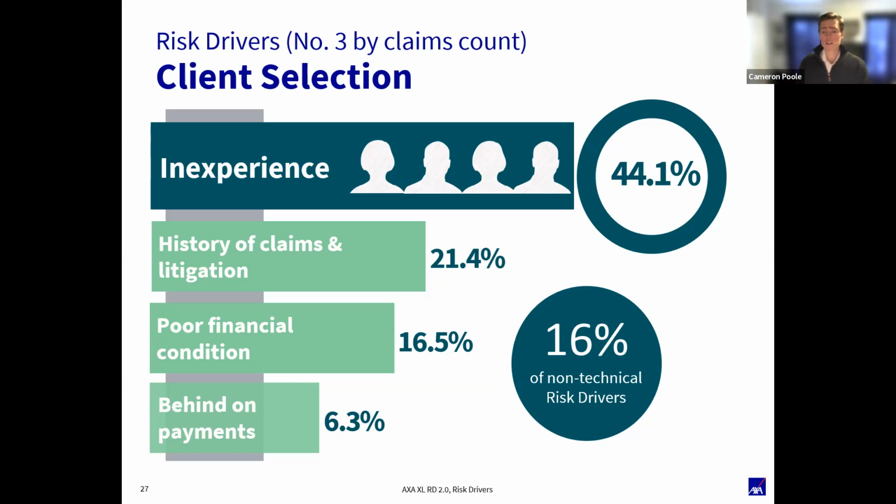You want to avoid suing a client for fees pretty much at all costs. What happens if a client gets really behind on payments, you're bad on accounts receivable, is there's that temptation to sue them to collect your fees. What we see is, you sue a client to collect your fees, almost 100% of the time, they are going to countersue you for design negligence.